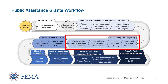As Phase 2 begins, the DI will be completed by the applicant, and the PDMG will use it to formulate projects and coordinate site inspections as needed. Each damage in the DI will be assigned a specific category of work, which reflects the type of work and or type of facilities. Each project will be assigned a lane based on whether or not the work is complete and how complex the project is. There are three possible lanes: Completed, Standard, and Specialized. Once an EEI is generated, the PDMG will send it to the applicant and recipient to complete.